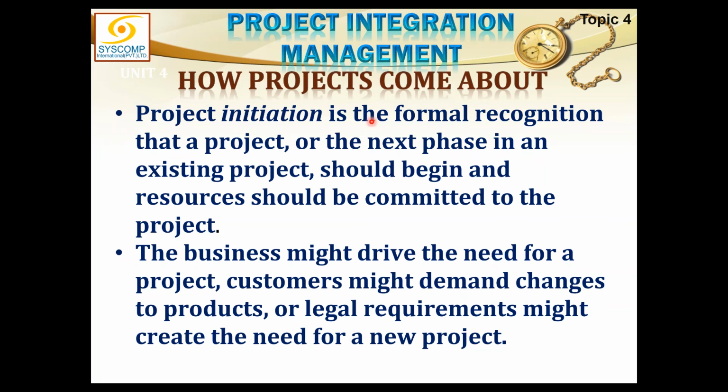This thing we normally do not understand. We only talk about the charter of the project. We do not talk about the charter of the phase. But a phase also is to be given a charter, and every phase has its own product. Maybe the product of one phase becomes the input to the next phase, but every phase is to be treated as a project, and every phase exercises all the 5 process groups. So it should begin, and resources should be committed to the project.